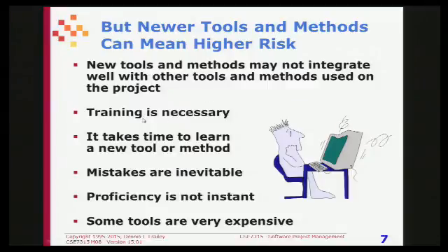You may have to train people. That means you have to spend time to train them, and money. It may take time to learn how to use the new tool efficiently. You're probably going to make mistakes with the new tool because you're not used to it. Some tools cost a lot of money. And one thing that's not on the list is sometimes a new tool sounds great, but the person or the company that makes the tool goes bankrupt. And then there's no support for the tool.